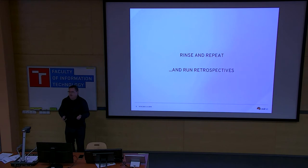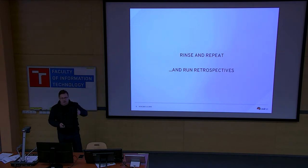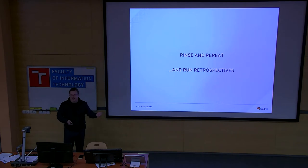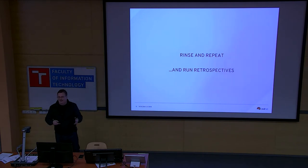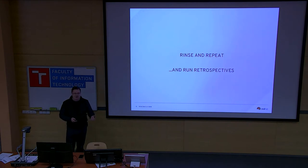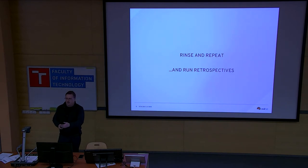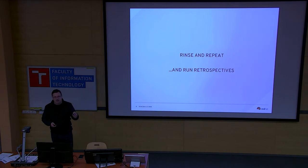Another rinse-and-repeat example is what we call snapshots — on a weekly basis we create all the ISO images and test them. That's another rinse-and-repeat approach. Today it's called DevOps or Agile; back then it was waterfall, and we called them snapshots. The terminology changed, but the benefit of doing something repeatedly, as quickly as possible, in a way that becomes routine — there's a lot of value in that.